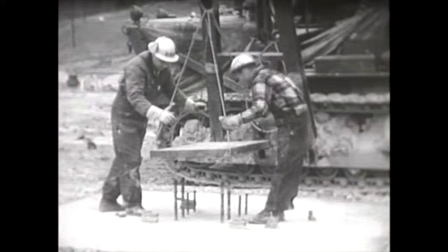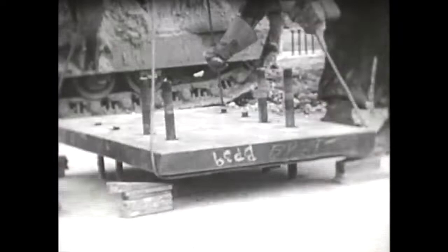Placement of the base plates for columns of the buildings was held off as long as feasible to permit maximum foundation settlement. After placing at exact elevation, the base plates were grouted beneath by a placement of low shrinkage grout.